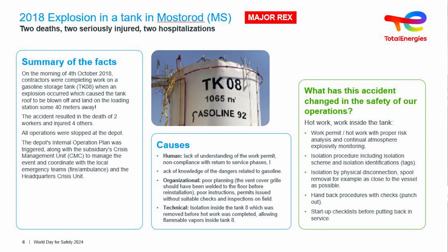And of course, lack of understanding of the permit to work process. There was no compliance. We saw the way the permit to work was handled. It was issued without going to the field. Someone in the office is issuing a permit to work when you're supposed to go there and actually verify what's in the field. So there was a gap.